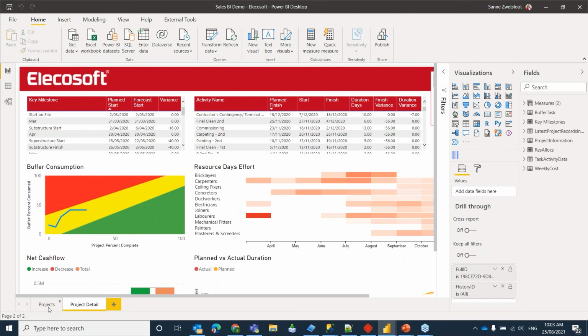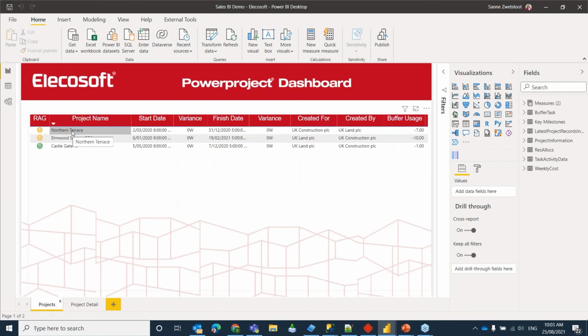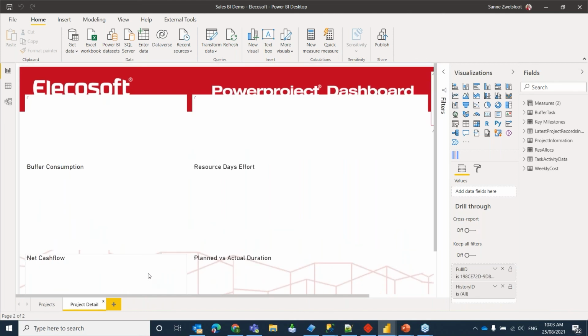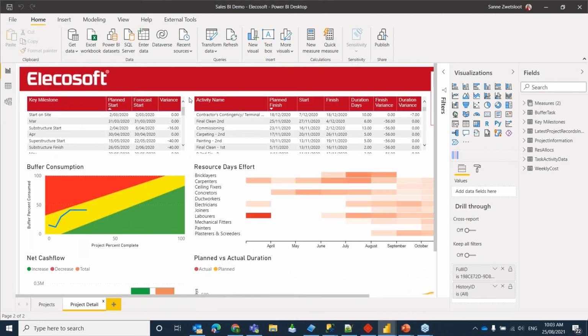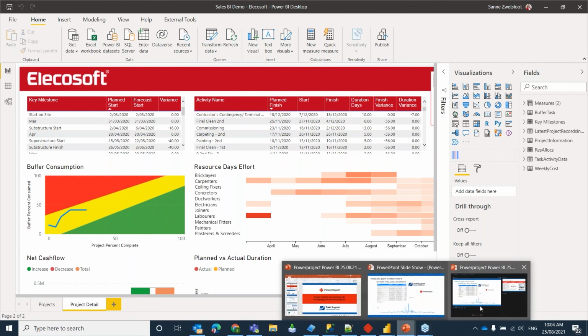If in one of your programs you have used resources, but in the other not, and maybe the resources are called differently, have different names, it will be way harder to pick them up in your dashboard, or at least you will still be able to see them, but maybe not in the same consistent way. So it's really hard to compare them. Just go back to my presentation.